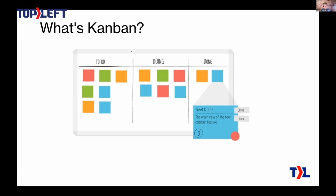What that might mean is that if you have some place where you keep your to-do work, like a very simple Kanban board, obviously, but if you had a process where you took all the new work that you knew you needed to do, and then you had a process where you refined it a bit so that the tickets in one spot are definitely ready for an engineer to work, then you're constantly replenishing that. It doesn't happen at one time during a certain period during a sprint. It's just constantly done.